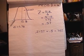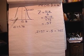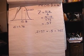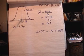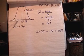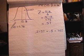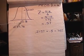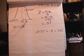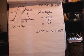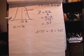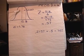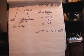Now, the first assumption we make is that the total project time is going to be normally distributed. Okay, normally distributed. And the expected time, the fifteen, that we had on the critical path, is at the mean of that distribution. Now, some people may argue with this assumption and say, well, it's not normally distributed. It's probably going to look something like this, because most projects are late. But let's just go along with the assumption that if you've got a lot of activities, probably more than thirty when the central limit there kicks in. But anyway, you've got a lot of activities, let's assume it's a normal distribution, with a mean of fifteen. Well, earlier I stated we wanted to calculate the probability that it's within sixteen days. So we'll put sixteen on there. And so I'm interested in this probability down here. Of course, since we know this is a normal distribution, we know that the probability on each side of the mean is fifty percent. So we know that this area in the bell-shaped curve is fifty percent. What we don't know is this area here.